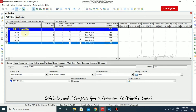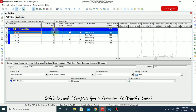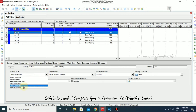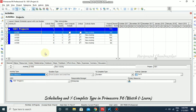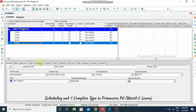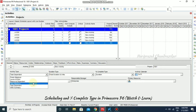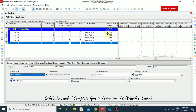We can make one activity a start milestone — so activity type, I'm going to set it as start milestone. And this one I'm going to set as finish milestone. Then automatically the duration becomes zero days.